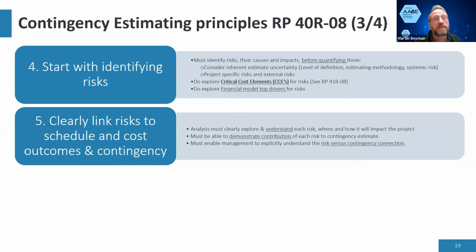And the impact is perhaps much wider than what your heat map had originally suggested. Because when you start looking at where this thing impacts my schedule, you start realizing a couple of things. And one of the things that also happens is that you can identify perhaps the schedule impact of a risk, but you don't know how to quantify the cost impact of that on P's and G's and everything. And that will be an answer coming out of your QRA.